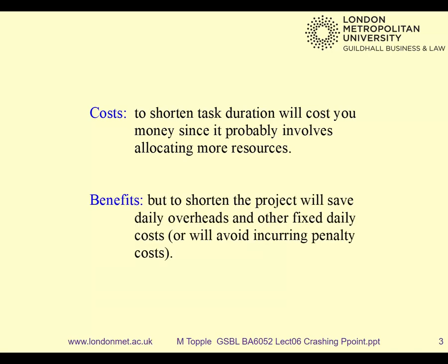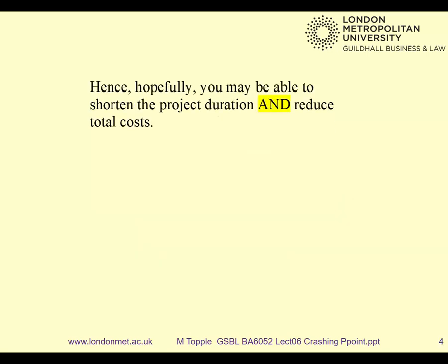But the benefits are more obvious, because if you shorten your project, you save on the daily overheads. That might include your salary, of course, so it's not all good news. But the benefits avoid any overheads. So every day you can shorten the project by, that's a day's overheads avoided. And we will compare the benefits received from making it shorter to the costs of making it shorter.